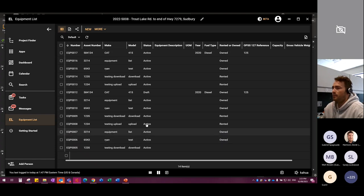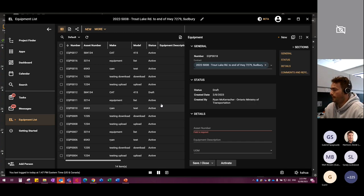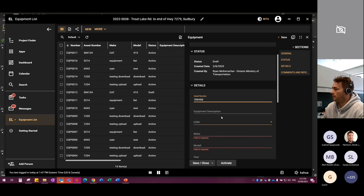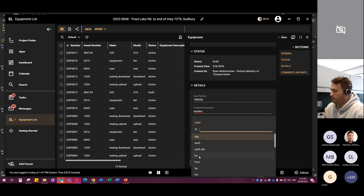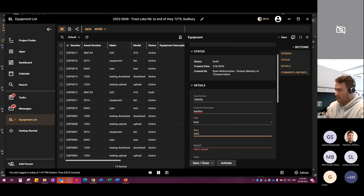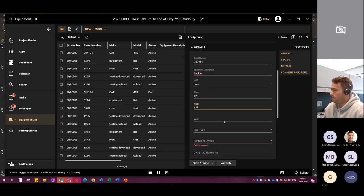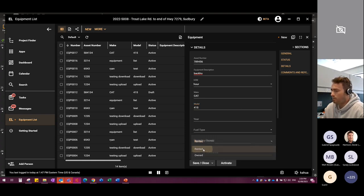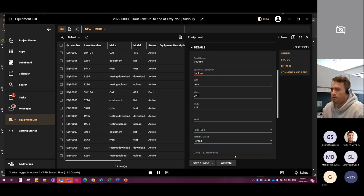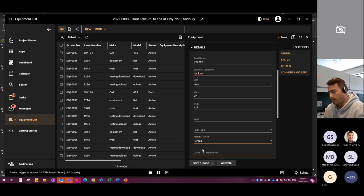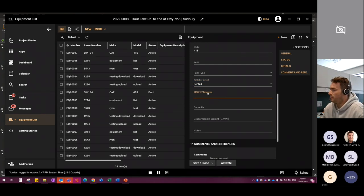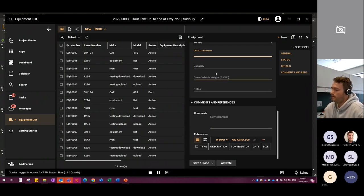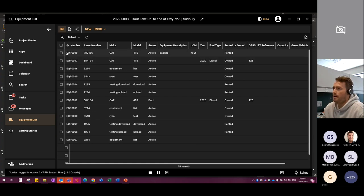Here's the equipment list. Click New — enter your asset number and equipment description. Rented vs. owned is necessary for the TMSP as it needs that to properly calculate amounts. Same with union vs. non-union for laborers, and prime vs. sub. You can put an OPS 127 reference in here for the unit rate, gross vehicle weight, and other details. You can even upload a picture. Once complete, just click Activate — it's now active.